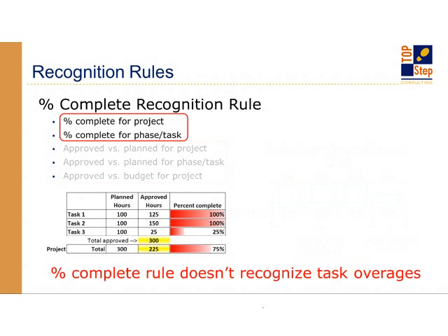And this is a different way to present it, but think of it as the same scenario. Okay, you've got 300 hours. If you're looking at this little chart that I've got here, 300 total planned hours. I've worked my 300 in January, February, and March. However, in this scenario, because I went over budget on task 1 and 2, it capped the recognition on those. So I've only recognized 200 hours for those first 2 tasks and 25 hours for task 3. So I've only recognized 75% of my revenue through 3 months.